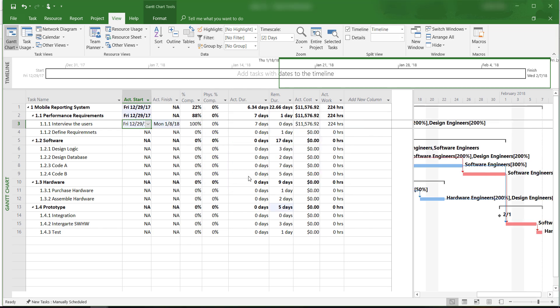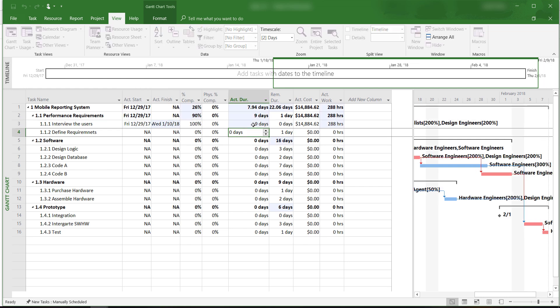Let's say that we run into some problems, and it actually took us 9 days instead of 7 days to complete this task, interview the users.